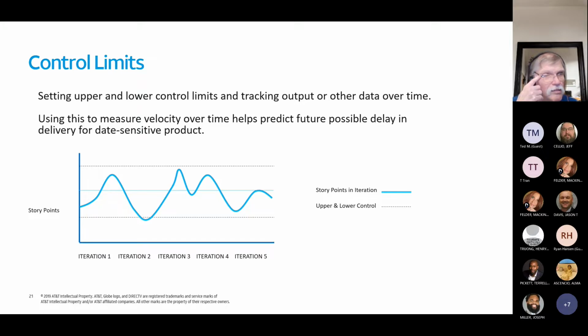As we move on to future iterations, the level of complexity of the work can increase, and other factors come in, the security, and other unknown issues are popping up. So the team might produce fewer user stories. My point is the nature of work, the complexity of the work in iteration 1 compared to 7 and 8 could be very different.